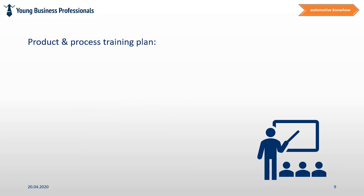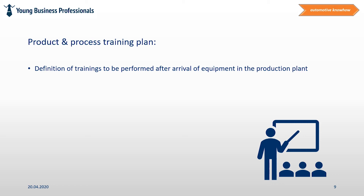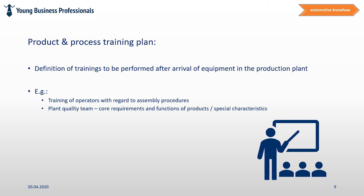Product and process training plan. Over the period of time in which all suppliers are working to produce the production equipment, you get time to define which trainings are required for the team in the production plant that shall be responsible to run the production line in the future. It is important that all employees who will be responsible in future are being trained as detailed as possible. In order to make sure that no essential part of the training is missing, it makes sense to create a training plan covering who needs to be trained, when, and by whom. Important trainings might include training of operators with regard to assembly procedures, and the plant quality team needs to be trained with regard to core requirements and functions of products and special characteristics, as well as the production manager.